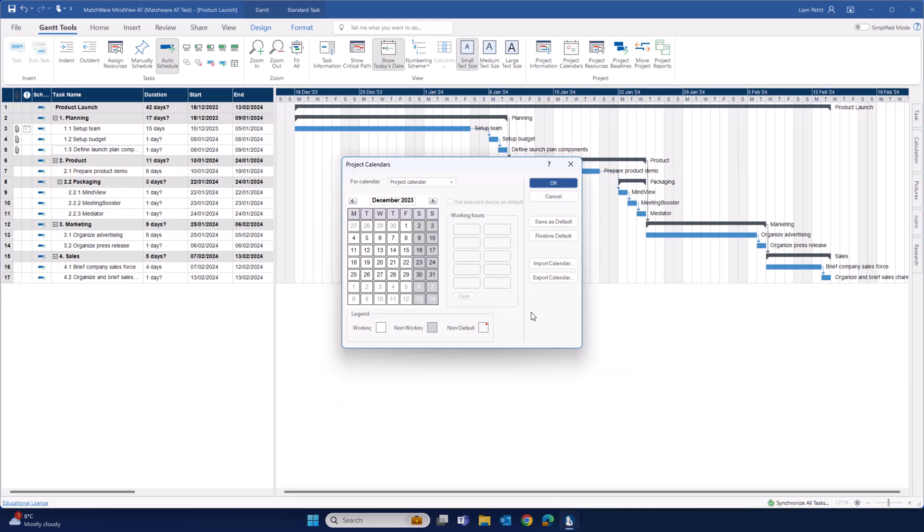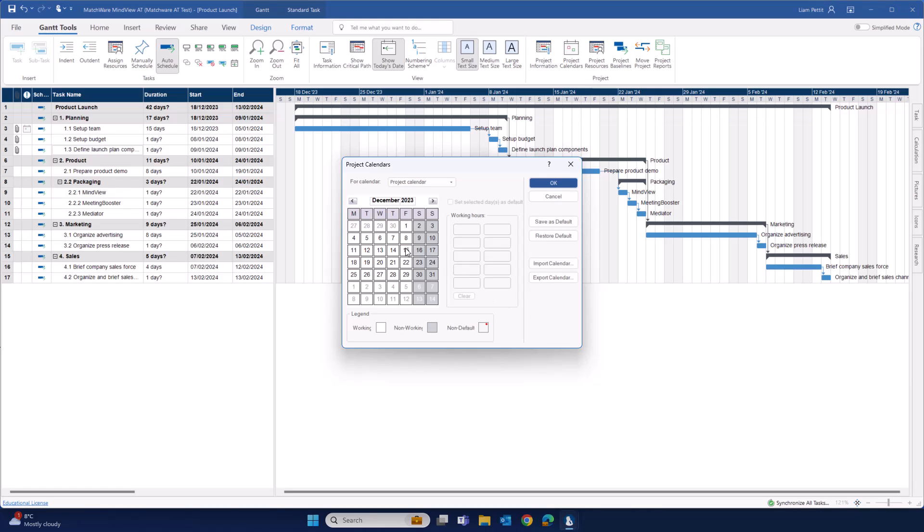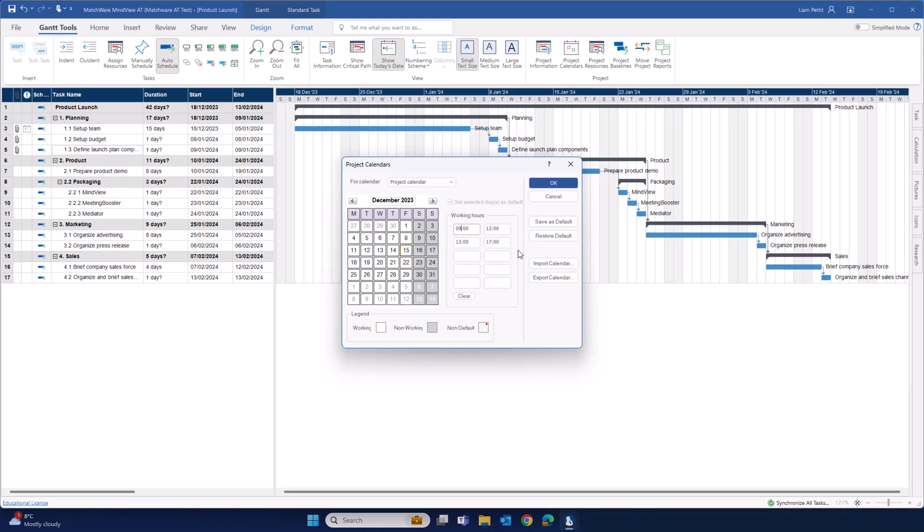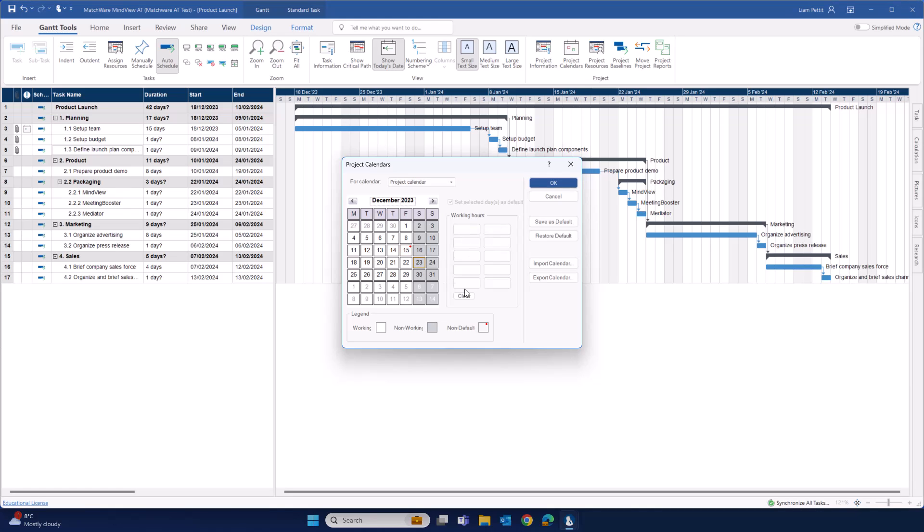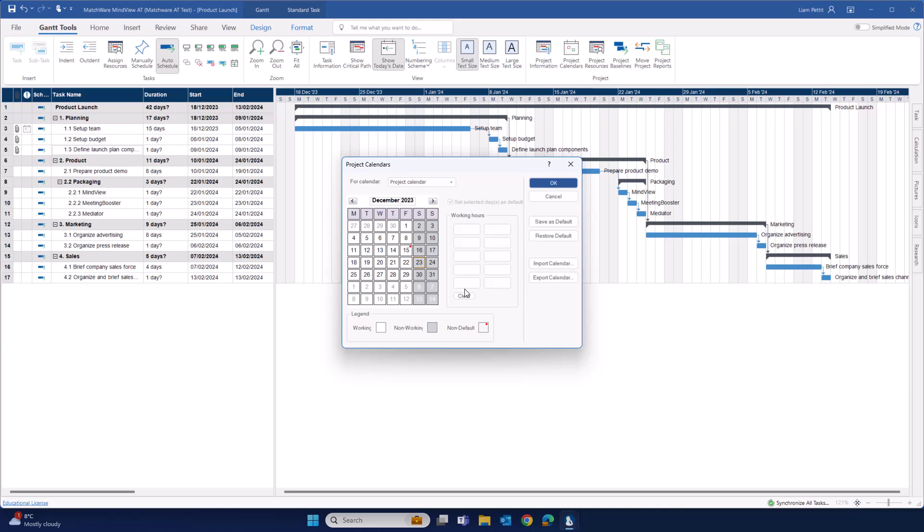It's very easy to customize the schedule in the calendar. One option is to select the specific day and adjust the working hours accordingly. Any edited day is easily visualized within the calendar. Let's say, for instance, you want to edit the schedule of a day for every single week. Instead of selecting the specific day, select the column and edit the working hours.